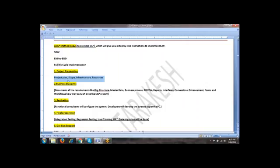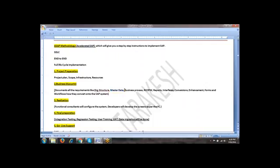Now the most important phase is business blueprint. Business blueprint is nothing but documentation of all the requirements which are gathered from the client. They need to document step by step how they are going to build the SAP system to suit the exact client requirement. SD functional consultant will prepare SD business blueprints. MM functional consultant will prepare MM blueprints. FICO - like this module specific, they will prepare the business blueprints. The blueprint will consist of organization structure, the master data we are going to use in this particular project, what are the different business processes - sales, purchasing, and different scenarios. All will be documented.